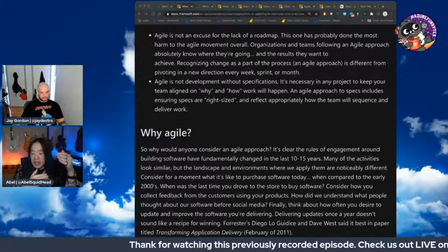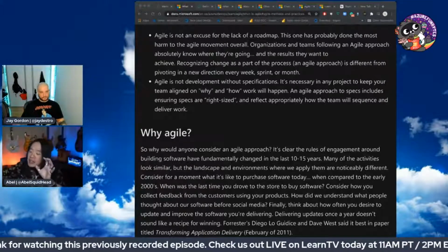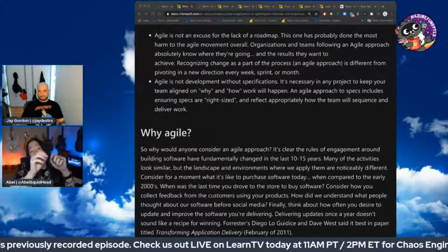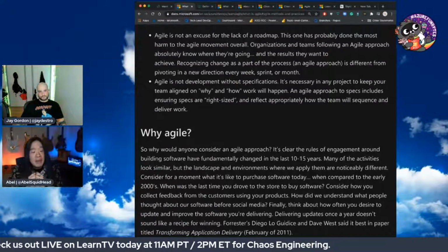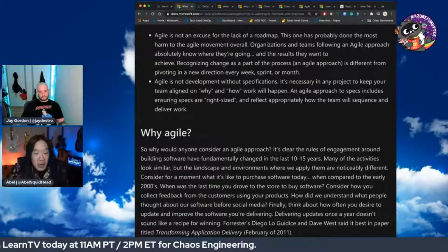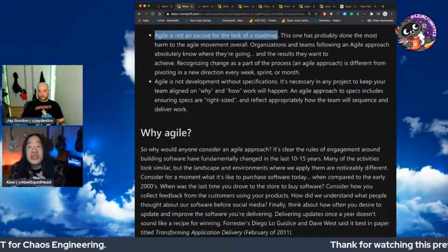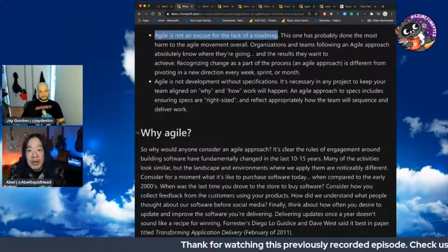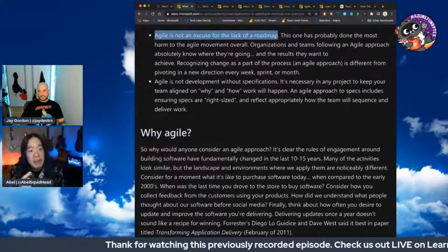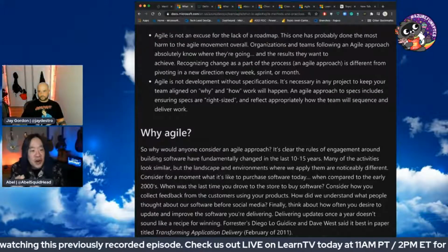He can look at the list and say, oh, I thought I wanted the other 3 things next, but now that I've seen these 3 things, maybe I want some other stuff more important. Or maybe he'll look at the 3 things that you created and be like, ooh, that's not what I wanted at all. Sure. So that's course correct. Let's fix that, right? So instead of wasting months and months of time, within one sprint, you can course correct and start fixing things. But then this same process just rinses and repeats itself over and over again.